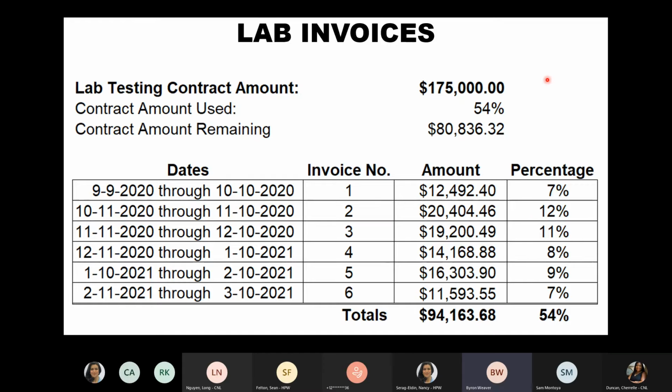So far, things have gone pretty well. I think you got pretty close on all of those. I think there's been one or two adjustments to those numbers that you have. So we're a little more than halfway through our budget, but in reality, we're probably closer to 60% done with our work because of SER being ahead of schedule. So that's a good thing. We haven't had any real issues. We had a couple of minor hiccups, but we got past them this last month. They were nothing major. So testing is going well.